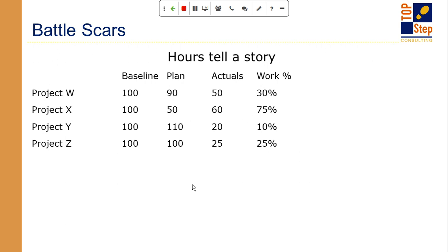But then as I'm working on the project, let's say I've recorded 50 hours so far from an actuals perspective. That alone should tell me, okay, I'm still under budget, right, because I've got actuals of 50 hours. My plan is 90. My baseline is 100. But my work percent complete is only at 30%.